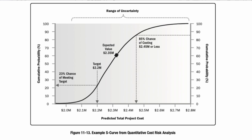Here is an example of what that output looks like, based on cost. The targeted budget was 2.2 million USD for the project. The analysis said there is only a 23% chance of meeting that target. However, there is an 85% chance of meeting a cost of 2.4 million or less. Monte Carlo iterations give you a confidence level — similar to a weather forecast saying there's a 50% chance of rain today, based on a lot of data and permutation combination.